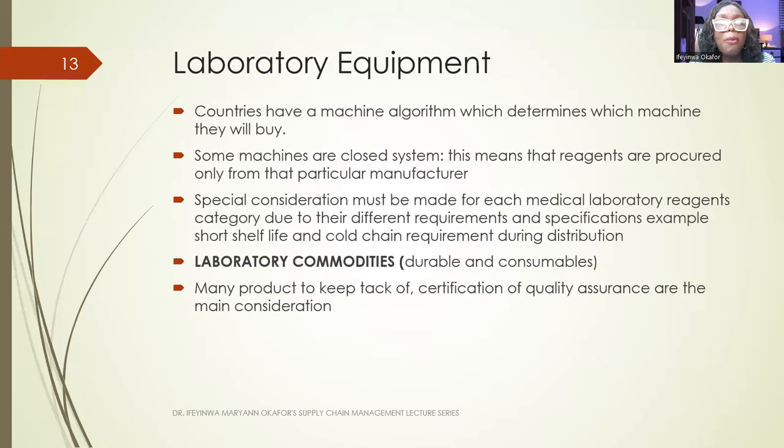What I'm saying is that justification for single source might be because of a directive from government agencies like the Ministry of Health Minister, ambassador, or funders like the United States Agency for International Development, controlling officer, with a good reason in writing for the direction for you to use that particular source for goods and services.